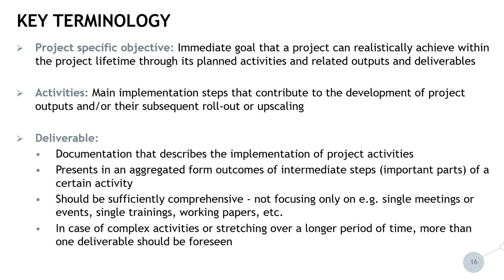Working papers which are just reflecting work in progress should not be provided as deliverables — rather, finalized products should be included as deliverables. In case of complex activities stretching over a long period of time, more than one deliverable should be foreseen in order to have good coverage of the related activity.